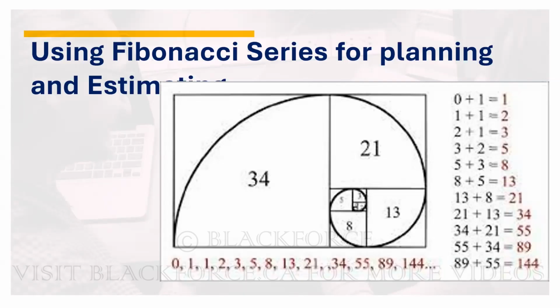You know that for me to do title track, I need to first understand all the titles. I need to be able to order the title A to Z. Oh, it will take me more effort, right? So you will now be relating it to login page. If you say login page will take you 2 story points, you should know that title track will take you more than that. Okay, so that's how you do your estimation.